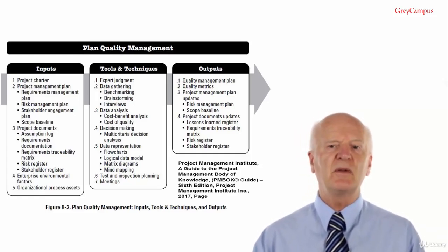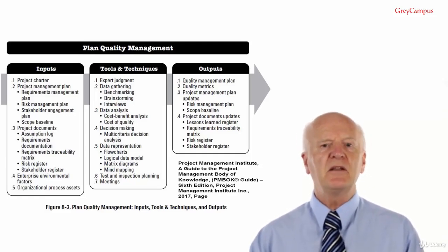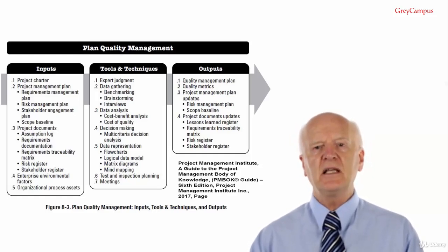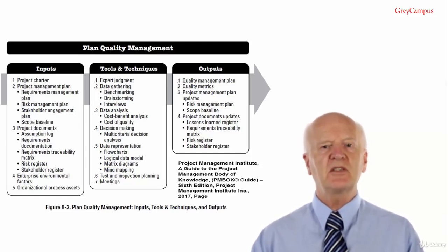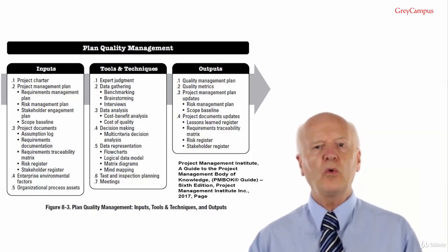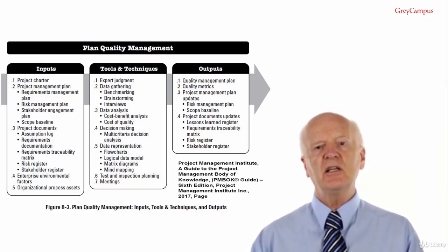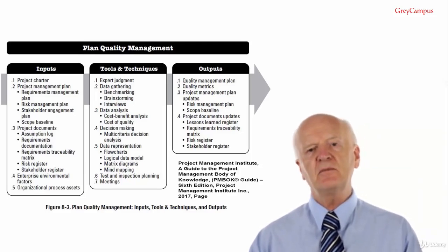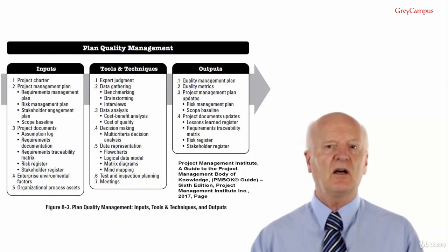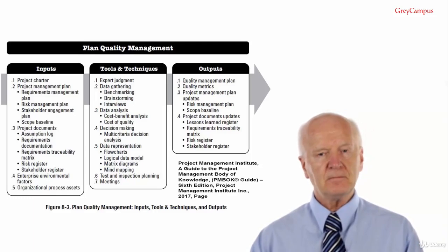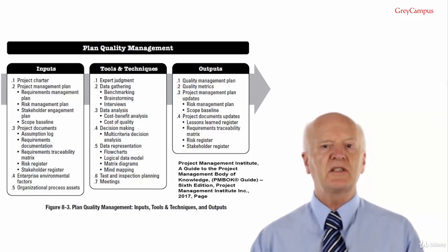Depending on how many factors may be confirmed, the project manager can use different shapes of matrix diagram, for example, L, T, Y, X, C and roof-shaped. An L-shaped matrix relates two groups of items to each other or one group to itself. A T-shaped matrix relates three groups of items. Groups B and C are each related to A. Groups B and C are not related to each other. A Y-shaped matrix relates three groups of items. Each group is related to the other two in a circular fashion.